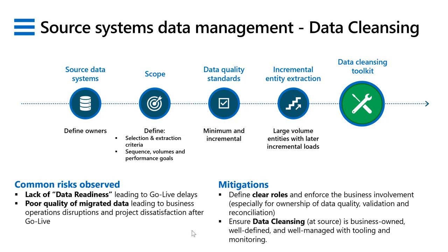So what does it mean, for example, if you're taking customer records over? What does it mean for a customer record to be clean? Right? What is the minimum data quality it needs to meet in order for you to even extract it and take it through the data migration engine? And you need to be quite tough in terms of these standards, because of the amount of time projects waste trying to clean up data in the engine at the target system, when it's most often much better to fix the problem at source.